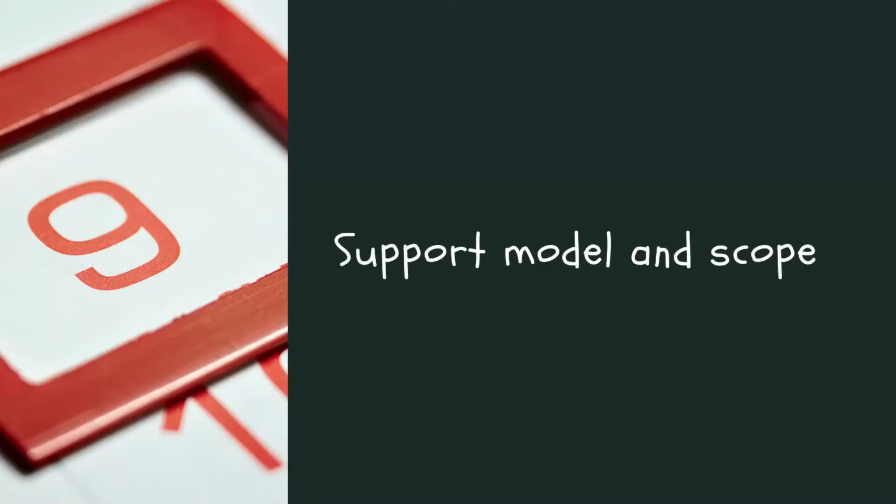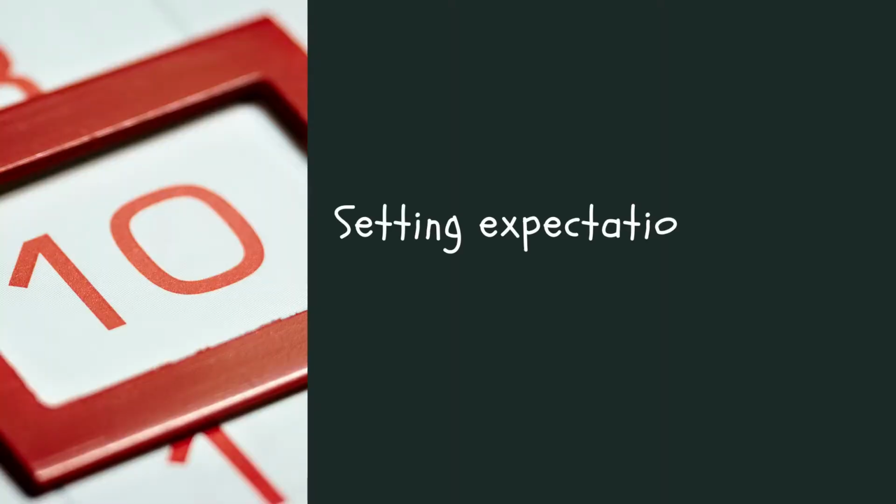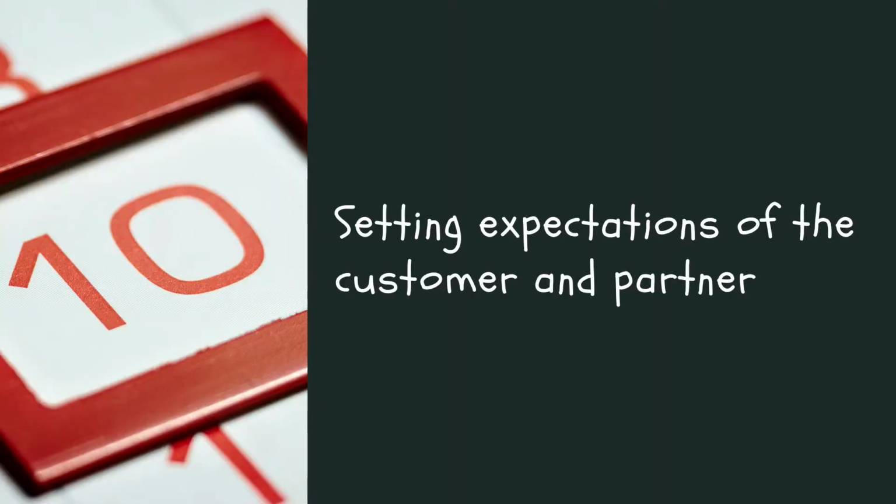Lastly is the support model. It should be clear how the project will support bugs, issues, and so on, not only throughout the project, but after the project is live. Your statement of work or project charter are all about setting expectations of the customer and the partner. The more time and effort you put in up front, the better off you will be down the road. While there may be changes to the plan later on, you need a baseline, and changes from that baseline should always go through your change management process, which will be discussed in more detail in a later nugget.